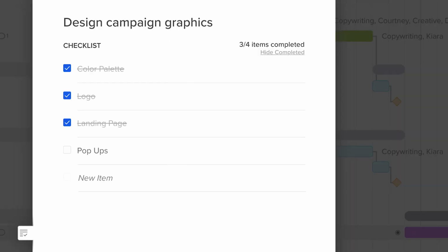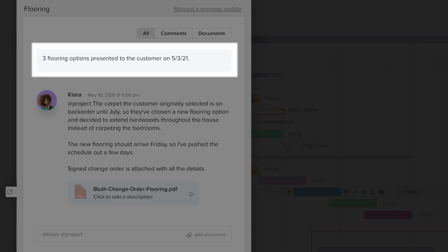Okay, so a question I often get about tasks is, how much detail should I include? My advice is to keep it to a single action statement. If it's a big action statement like conduct stakeholder interviews, I'll use the checklist feature to list out smaller subtasks that don't really need to show up on the Gantt chart itself. And if I feel like that's a lot, or maybe if it's confusing, I'll use the notes feature as well in TeamGantt to clarify those tasks.